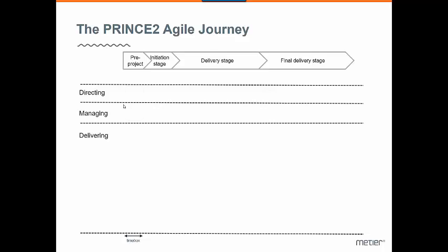So you set the time box, and then you use the starting up a project process like it's described in the PRINCE2 manual. But of course, you have to tailor it too. You're still going to talk roles and responsibilities, project board, project manager. Right, that's the same. As for the team level or the delivery level, team manager, you definitely want to talk about teams. What teams are we going to have working in this? Do we have an existing team that can do some work? That would be good. We don't need to spend time starting it up. Or are we going to set a new team together? Typically in a project, you would often create a new team for the project.